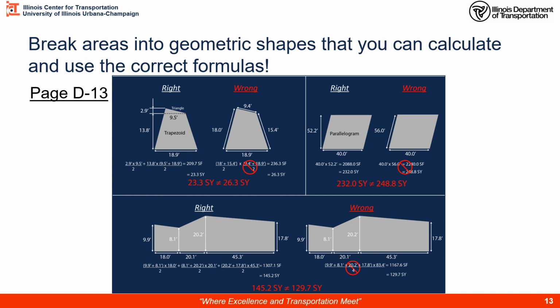That would be incorrect. Here we have an area which may be, here's the road and we're going up an embankment for sodding, seeding, mulching, something like that. We're taking individual height measurements right here, and we're going to average. We're going to calculate this area, these are not squares, they're trapezoids, and this area separately and add them all together. We can't average the heights and multiply by the entire distance. It just doesn't work.